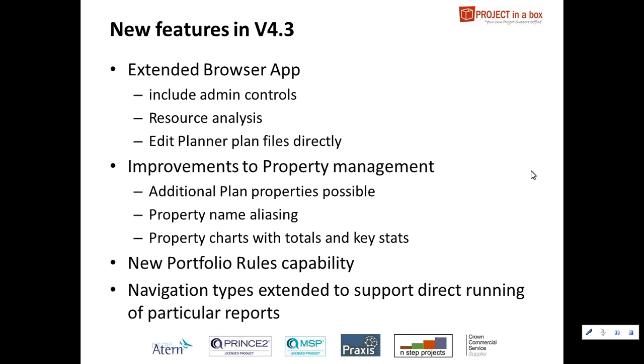So you can take that data automatically out of your plan. You just set up the rules, and it will then do that every time a project plan is updated. As part of updating the natural statistics, like we talked about, number of overdue tasks, it will go through and look for these other things as well, and it will then drop those into properties for your projects. So this is really useful at helping you match your real world circumstances of what you actually collect in your plans.